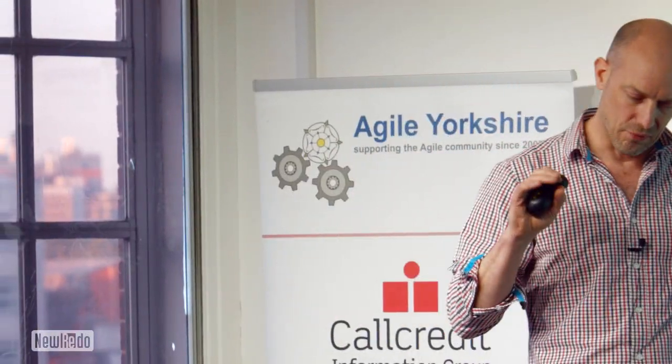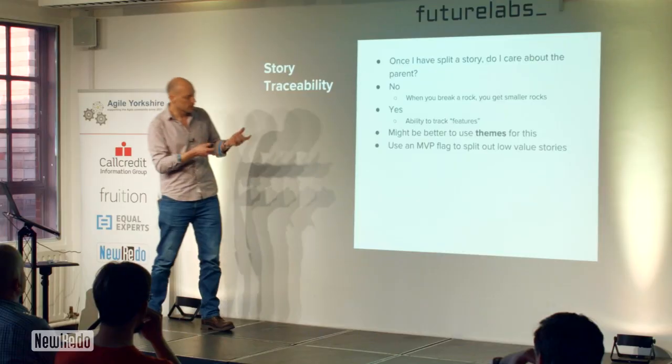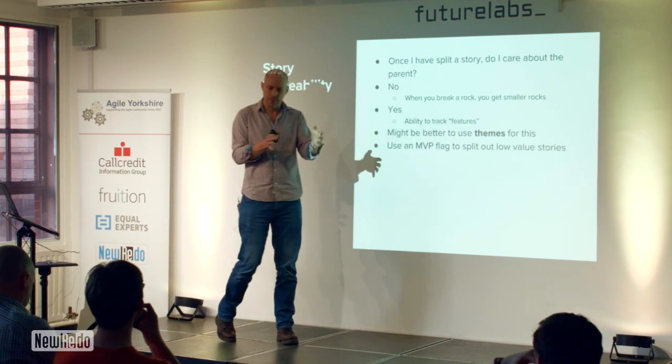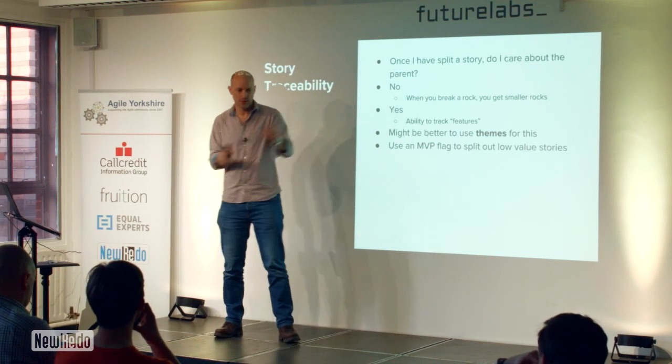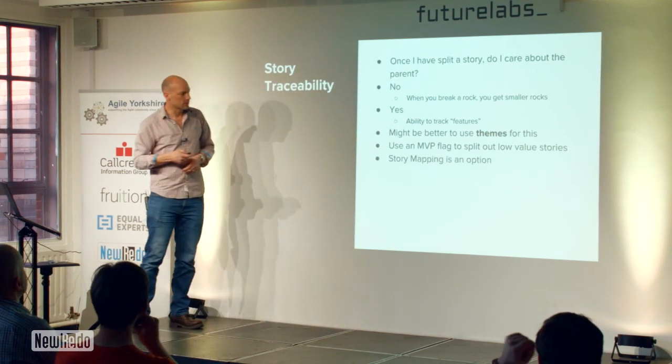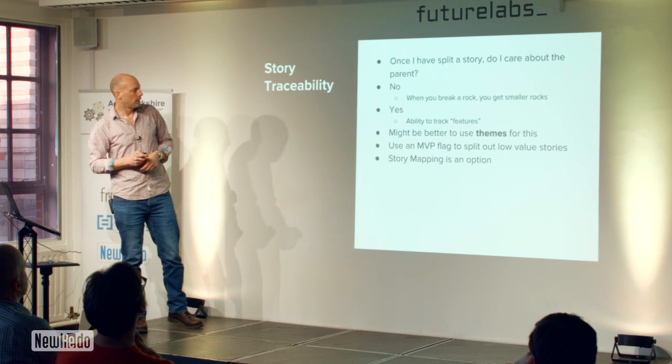Oh, hang on a minute. Some of those are low value. I didn't really want to do them. So you have to be careful not to get caught in that trap of grouping things together and then being committed to delivering all of them. So it sometimes becomes a good idea to go registration MVP, and registration of the stuff that we probably won't do for a while. And I think I'm going to be able to demonstrate that on the next slide, but hold on.